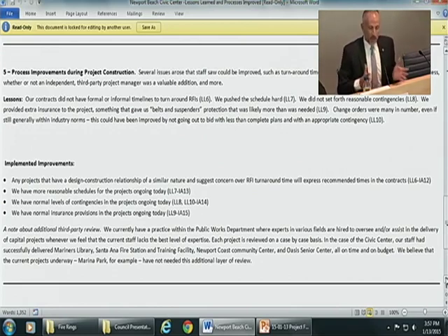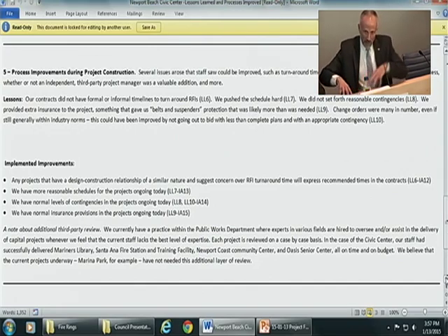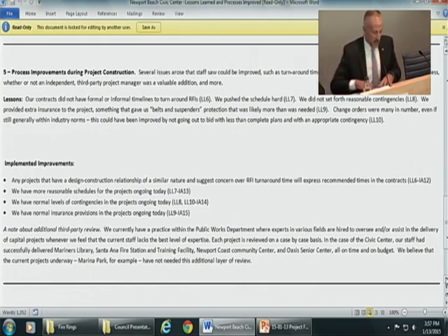The architect was used to going at a certain pace, an industry standard pace, but we were pushing the schedule. CW Driver, as the major contract administrator, had projects lined up one after another here. Steel would go in at this date, windows this date, electrical this date. And if there was a delay in the request for information in the architect's work, it would screw up the project schedule. And that did happen.